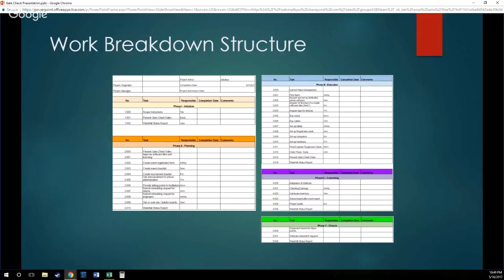The team has completed an extensive work breakdown structure, which is shown. This details the tasks needed to execute the event at a high level. All of the tasks are broken into categories called phases on the sheet. Phase 1 initiation, Phase 2 planning must happen before Phase 3 and 4 can occur, and Phase 5 will be the closure of the event.